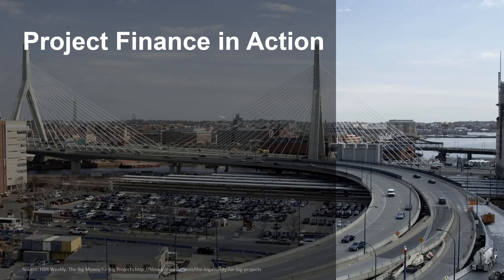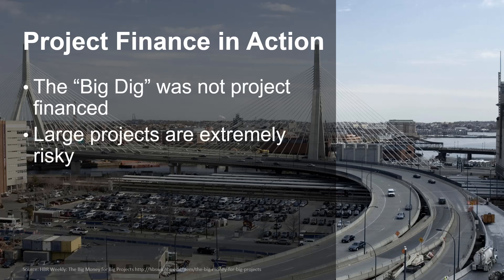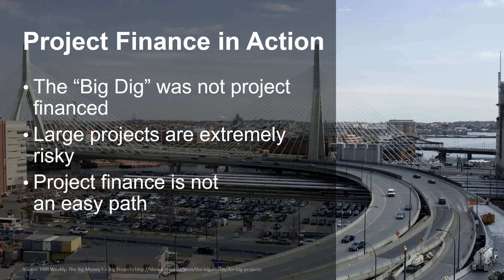Looking on Wikipedia, topping the list for most expensive public works project at $14.6 billion is Boston's Big Dig, whose official name is the Central Artery Tunnel Project. The project was municipally financed and not project financed. An important point to note is that these large projects, whether project financed or not, do carry huge risks. Many large projects — Euro Disney, for example — have had their share of financial woes. Project delays are quite common. Project finance is not an easy path; specifically, project finance projects have very large transaction costs, they take a long time to negotiate and close, and as you can imagine, the contracts and organizational structures that enable these projects can be extremely complex.